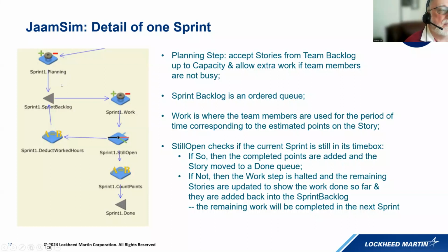Let's say a 3-point story, a 3-day story, comes in, and it's the first one on the backlog, and the first person takes that and works on it for 3 days. Now there are only 7 days left in the sprint. So they'll finish the 3-point story and claim 3 points. The next story they happen to pick up, say that's 8 points. Now they need 8 days to finish that. They're not going to finish it by the end of the sprint. They will get credit for it when they finish the 8th day during the next sprint.